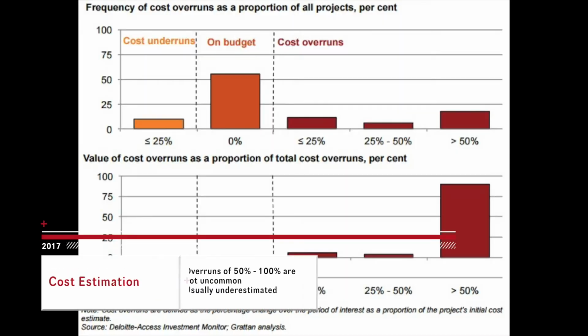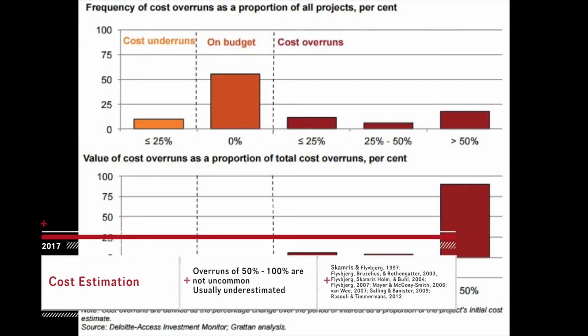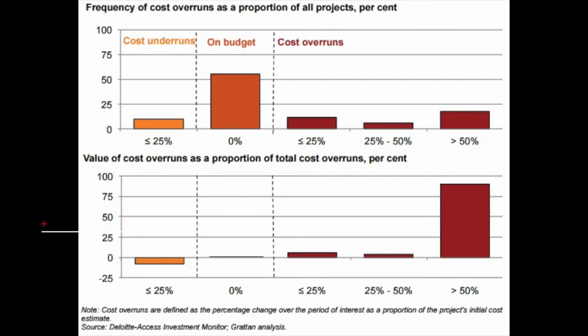Cost estimation. Australia is notoriously an expensive place to build modern infrastructure, and cost overruns generally fall into three categories: overly optimistic ex-ante cost estimates based on forecasts, not reality; poor project management; and poor contracting practices. Having said that, it is only a fifth of all road and rail projects that make up 90% of cost overruns by value, i.e., when things go bad, they go really bad through knock-on effects.